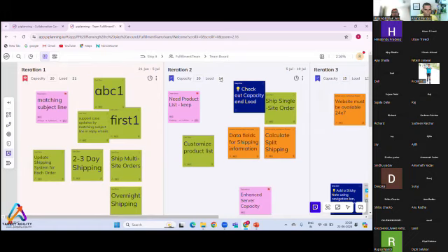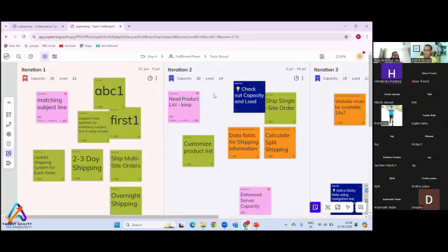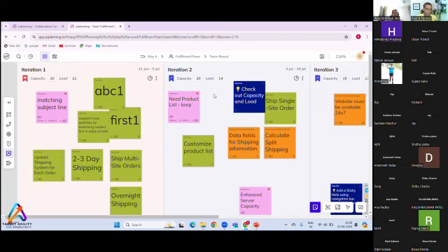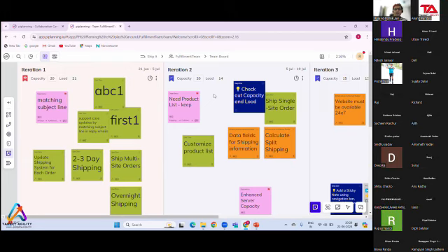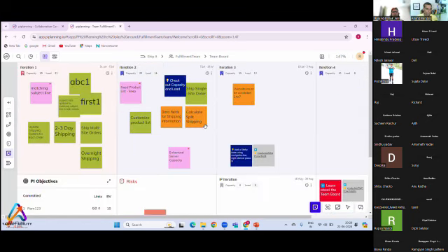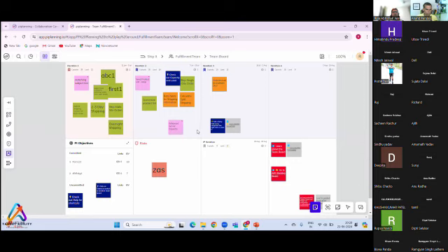Here it is showing blue, with a number such as 14. Load is 14. It means load should always be less than or equal to the capacity. If you want to keep some buffer, you can keep some buffer, but load should not be more than capacity. Absolutely fine.